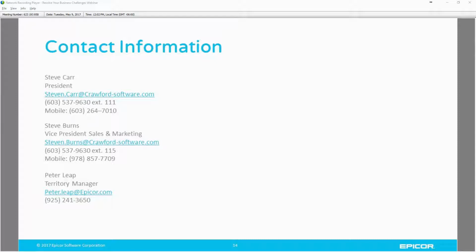So typically what we would do with that is put together a very detailed list for you of all the modules and all the enhancements that have been put in place, give you time estimates, and start looking for, can those be replaced with standard functionality. But on average, if you're looking for a 9 to 10 upgrade, you want to plan a month or 2 months, and that's with doing some adequate testing, making sure you're doing a full order to cash, procure to pay cycle, and bringing it through all the steps and testing every one of the new features, taking advantage of some of the new functionality, the emailing and the built-in faxing features that are there now, along with other test cases to make sure none of your customizations and enhancements have caused any issues or haven't upgraded properly. That's a typical one we hear a lot as far as the upgrades.